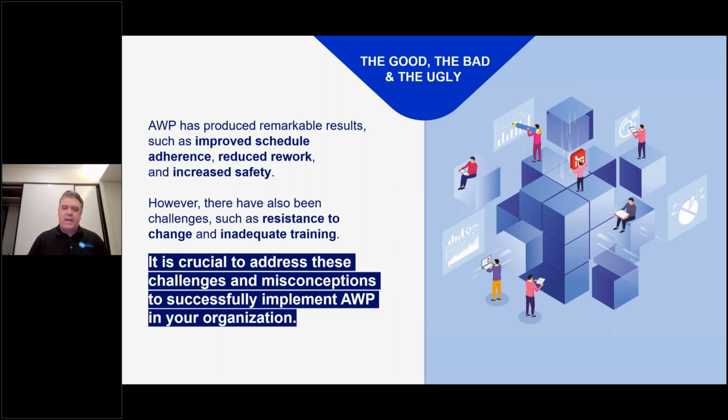No, you're planning an IWP sequence across the trades within the local area to identify my interdiscipline dependencies as those key constraints that are both in the field and constraints that need to be removed before, and what needs to be interfaces and sequences of trade dependent handoffs that happen in the field.